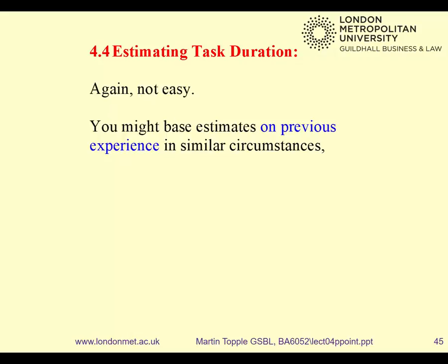But if 2 people plaster it, how would that change? A day. It would be quicker, wouldn't it? Some project managers say if one person can do it in 4 days, 2 people can do it in 2 days. It might not quite work that way, but at least it will be on those lines. So you've got to make that assumption, but even that is a guess in a way. Even on that simple project, how long will it take to do that?